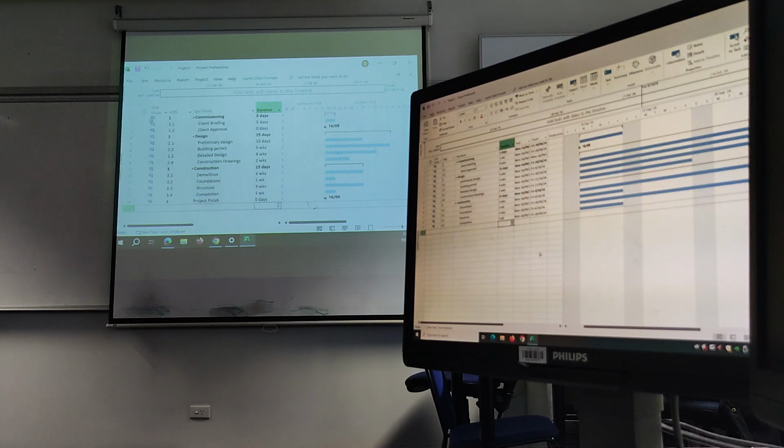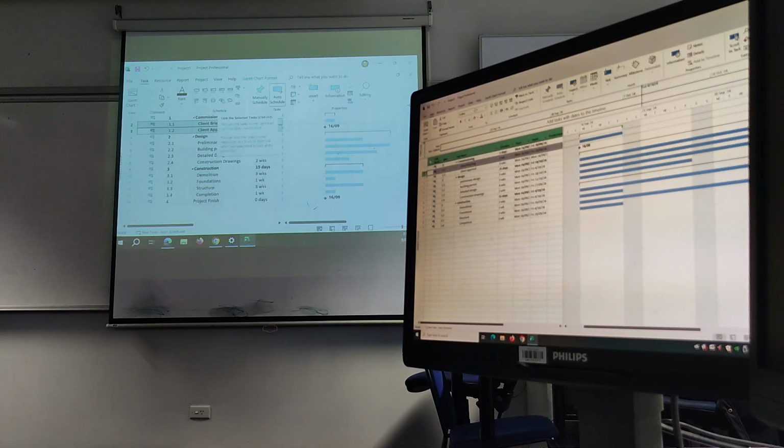So the way we do that is we only work with the work packages. So we start the client briefing, and the client approval is there. So I highlight that, then I press Control, and I left click on the next one. Then I go to Task, and I make that link. So those two that are together, I make the link there.